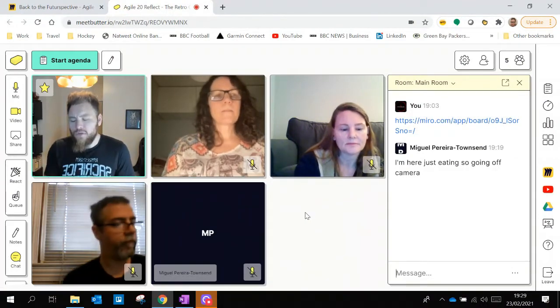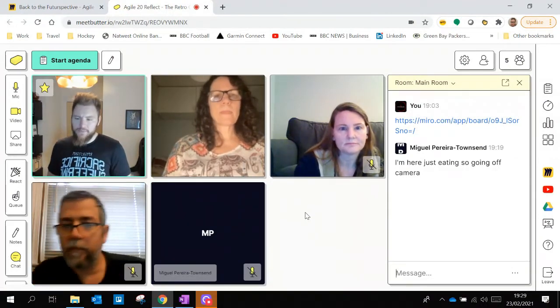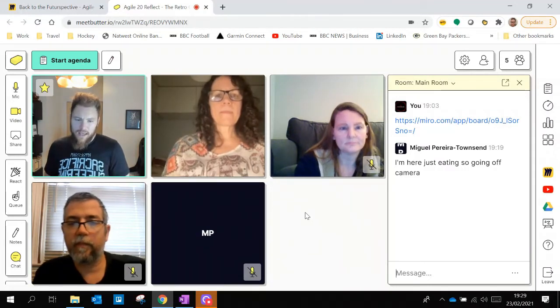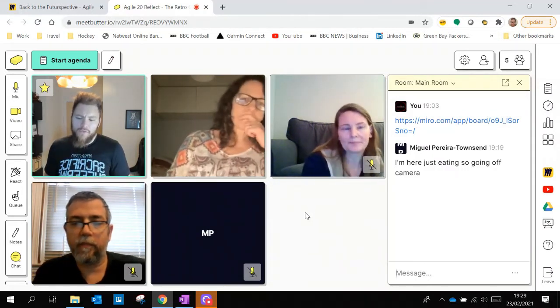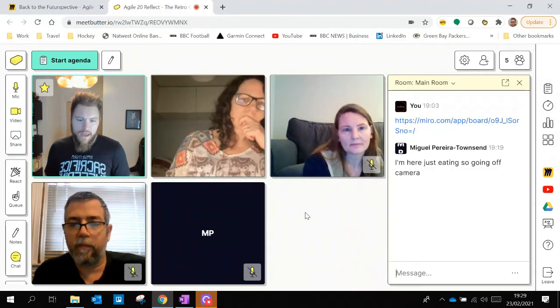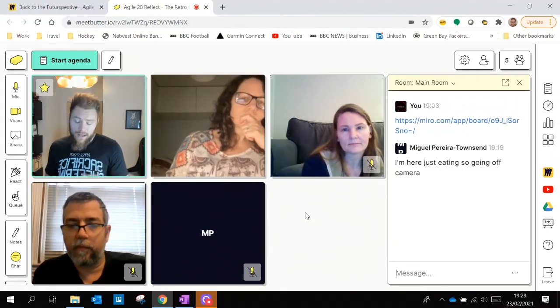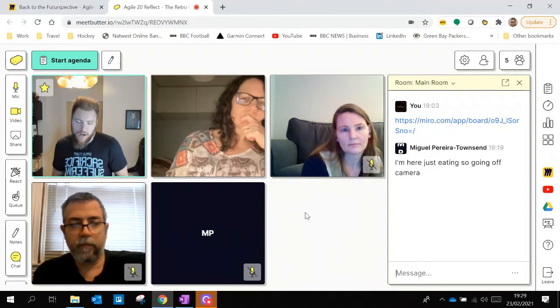I think not enough agile work is framed as an experiment. Even MVP. I find MVP is often misunderstood. MVP is intended to be an experiment. It's what can you learn in this time frame, and often it ends up being this gold-plated final solution, ready to go live. It's more a learning opportunity than the first version of the product.